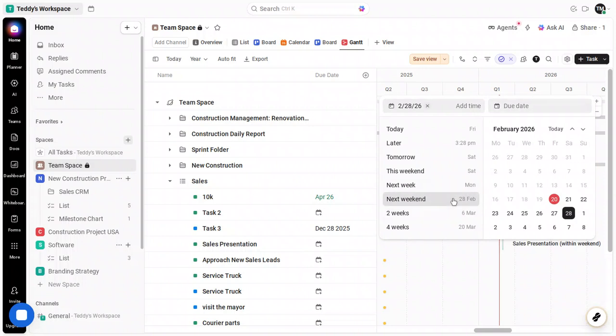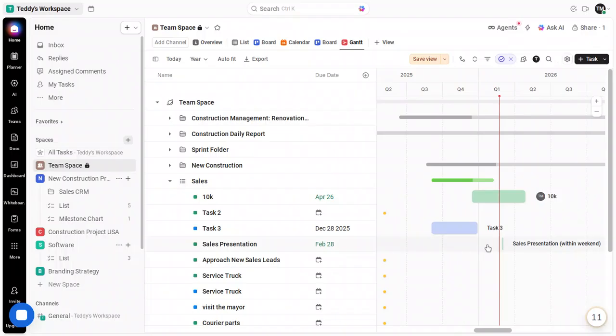If a task is missing dates or you need to adjust its schedule, you can do it directly on the chart. Click a taskbar to highlight it, then drag the left edge to adjust the start date, or drag the right edge to adjust the due date. If the bar isn't there yet because you haven't set dates, you can usually click in the timeline area next to the task name and create a bar by dragging across the days you want. Drag and drop adjustments are perfect for quick changes during a planning session or a stand-up meeting.